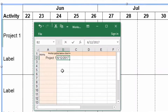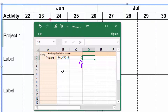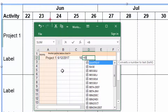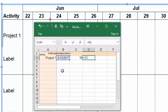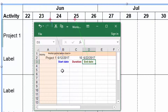Cells that do not contain data in an Excel date format will not create anchor points in the Gantt chart. This allows you to use cells as input for formulas — for example, task durations for calculating the end date from the start date of a task.